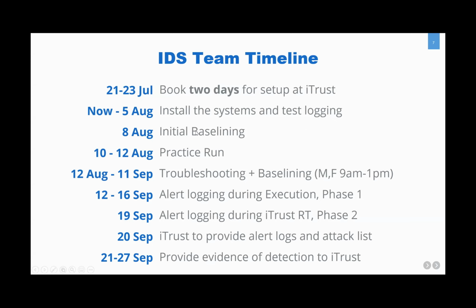Then after everything has been installed till 5th August, we'll conduct an initial baselining event on 8th of August. And then that will be followed by a practice run during 10th to 12th of August. Then there will be a 1 month period in which we'll figure out any errors that might have popped up and correct any kinks that we have witnessed during these events.